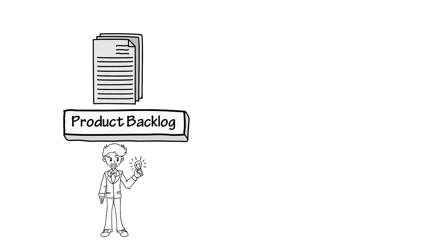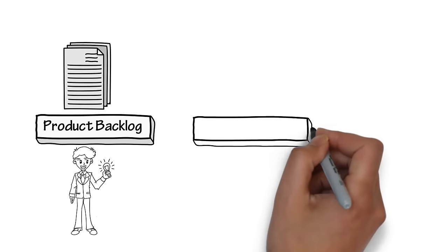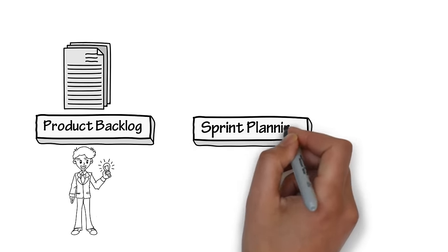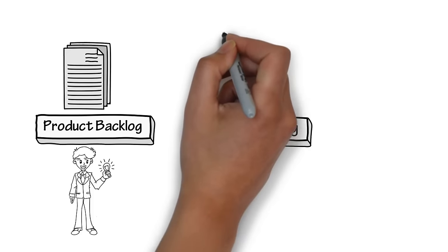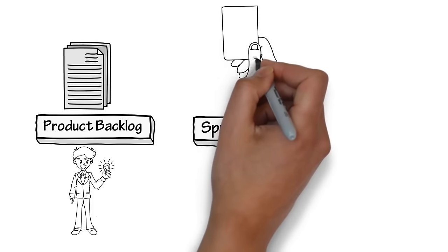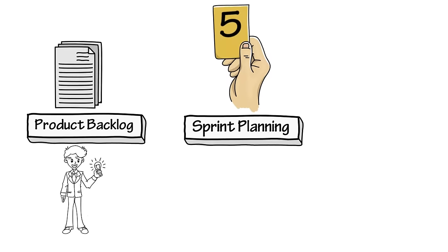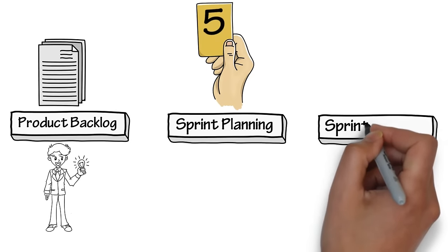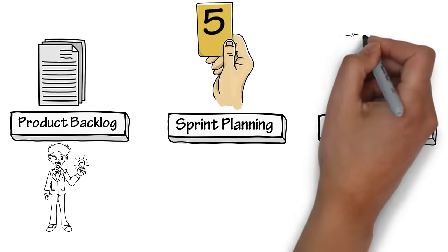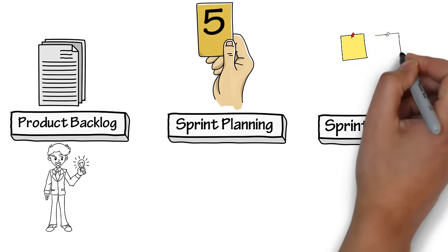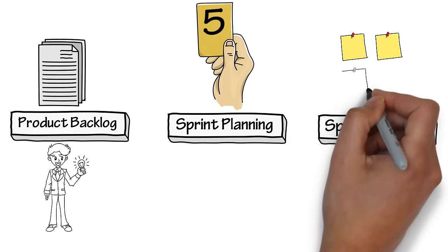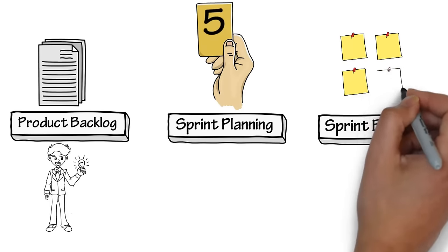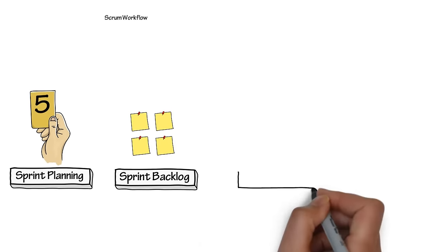Sprint planning is where the team, product owner, and scrum master discuss the top priority user stories, determining what can go into the next sprint. The output from the sprint planning meeting is the sprint backlog. This is a list of user stories that have been committed to for the next sprint. The entire team and product owner have a solid understanding of what each of the user stories involves, based on the discussions from the sprint planning meetings.